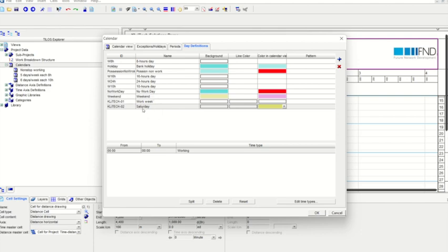Once we have selected here, we come back down and we repeat the whole process of 9. So again, this is the error which you will get if you're not going to add the split. So add the split first, non-working. Again, I'm clicking down, press split. So here, now we are going to work only till 2 in the afternoon. So this will be the working hours. Then from 2 p.m. to midnight 12, it is going to be non-working.